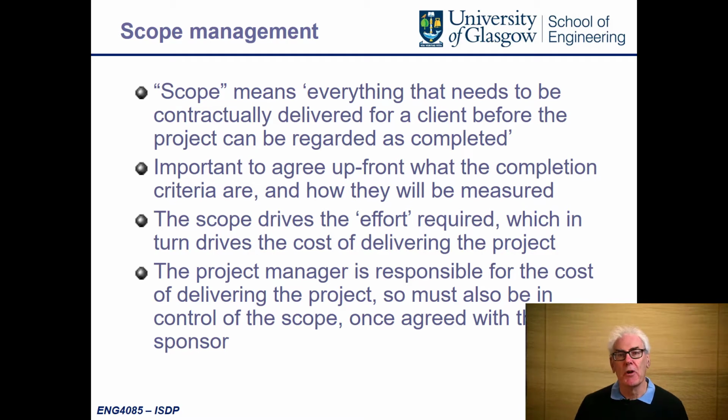How much you do within a project, or the scope, will define how much effort you require to put into the project. And that in turn will drive the cost. So you need to be very clear how much effort you're applying to each different part of the project. We don't want primary school football teams here, where the whole team run after the ball. We want professional engineering, where each individual on the team knows exactly what their responsibilities are and what they need to do to support other members of the team.